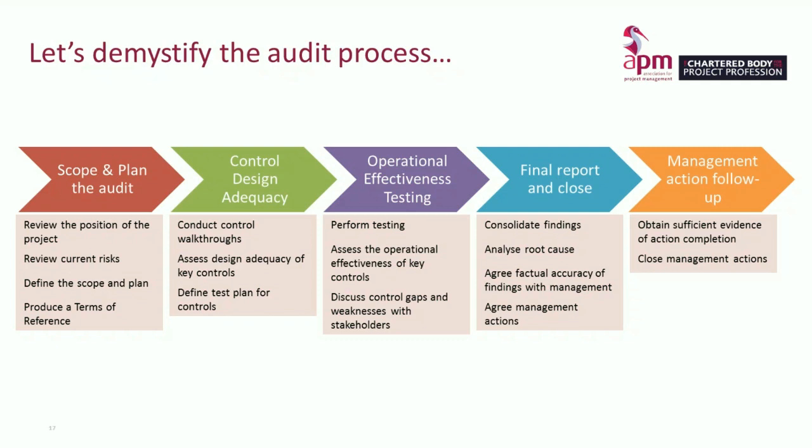The audit report will be sent to our key stakeholders, senior management, board and audit committee. And depending upon the rating, it may even be sent to a regulator. This is normally only for those that are rated as unsatisfactory, where we've identified major weaknesses in the risk framework. So it's hopefully not very often and not very common. And finally, we will track completion of the actions agreed with senior management, and we will aim to confirm that the weaknesses identified have been addressed.